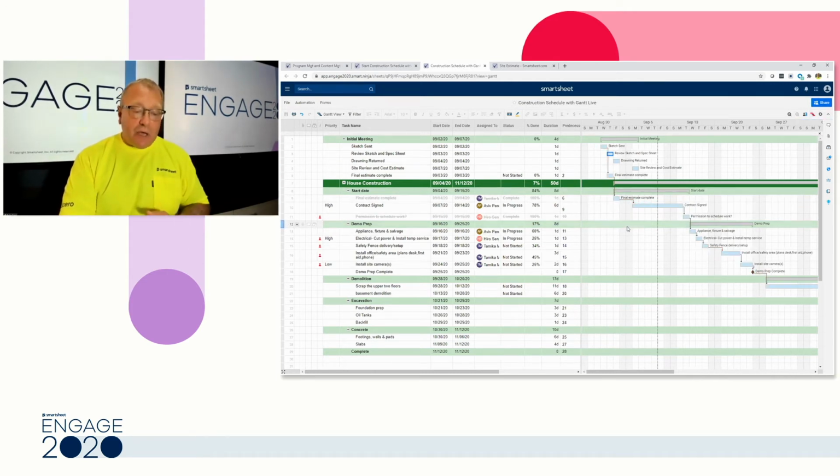And what about if I want to know for a single area, a summary area? And that's what this gray bar is, a summary area. I want to know all of the summary path of that. If I right click, I can say show summary path. And now you see all of those things that are connected within that path. I can check that for all of those different ones. I'll hide that.